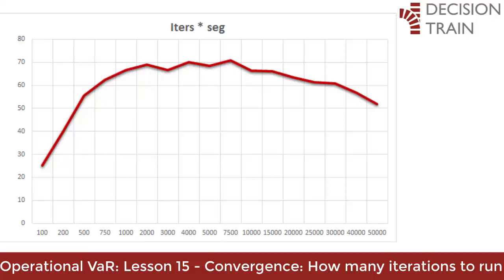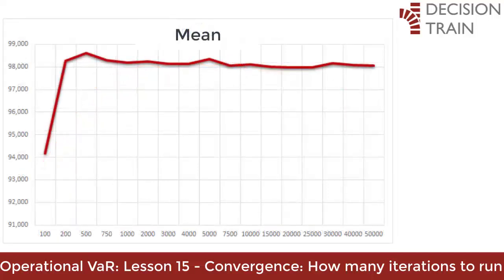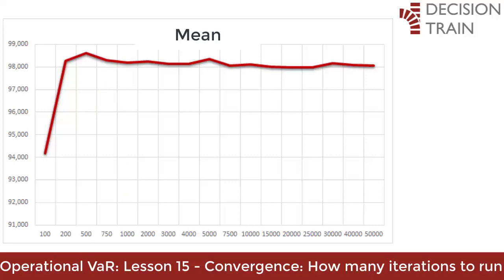Now again, depending on how precise you want to be on certain statistical goals, your number of required iterations may be different. For example, if you are only interested in the mean or average operational risk, based on the central limit theorem, 1,000 iterations might be sufficient. Before 1,000 iterations, the mean has not stabilized. It will take about 8,000 iterations for the mean to stabilize somewhat lower than what was calculated with just 1,000 iterations.